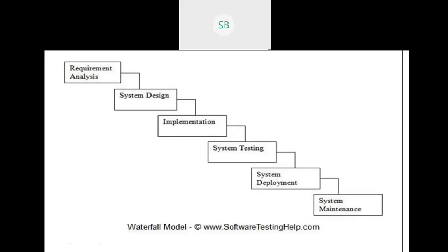Okay, but if you check here in these phases, the waterfall lines, there are no reverse lines. So after testing, if you find an error, you cannot go back to the implementation phase. Similarly, when implementing something, if you find that there was a problem in the designing part, you cannot go to the previous stages and modify it.